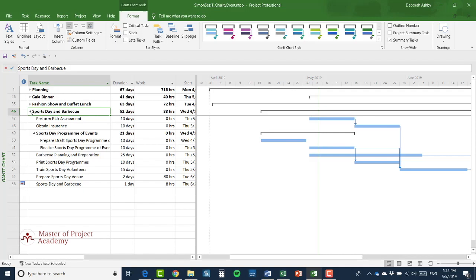I'm going to show you 1 or 2 options for splitting as we go through the next few sections. And as you'll see, there's very often quite a bit of work to do. Usually a very good proportion of that work relates to the relationships between the tasks, so in this case the initial program before we split it up, and maintaining those links when we split the program of work up.